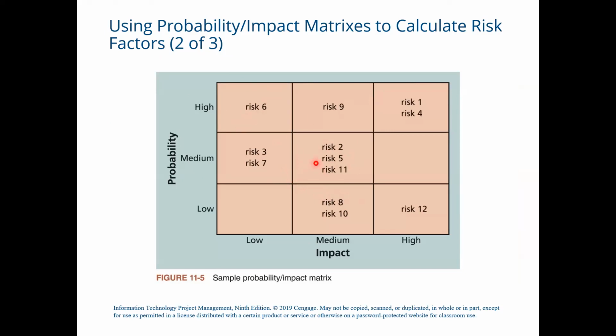So if I talk in the context of our opening case, for example, Cliff Branch and some of his project managers in the opening case could each identify 3 negative and positive potential risks for a particular project. They could then label the probability of occurrence and impact of each risk as being high, medium, or low. For example, one project manager might list a severe market downturn as a negative risk that is low in probability but high in impact. So you can put it according to that.